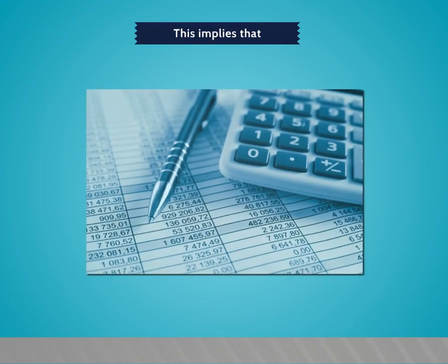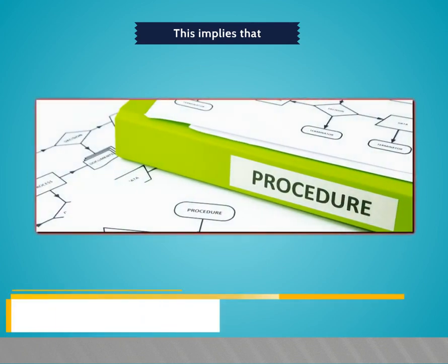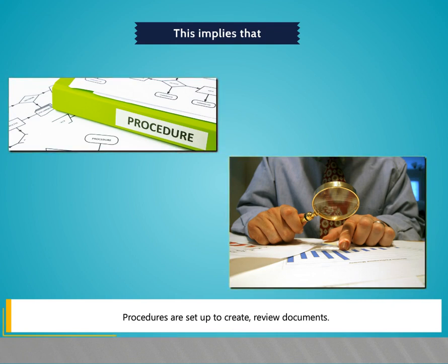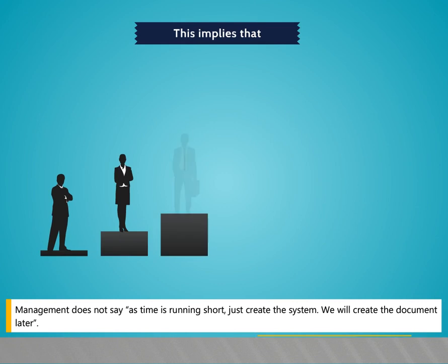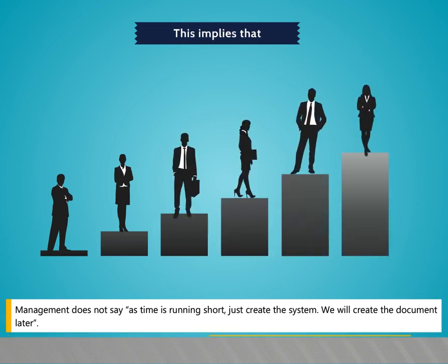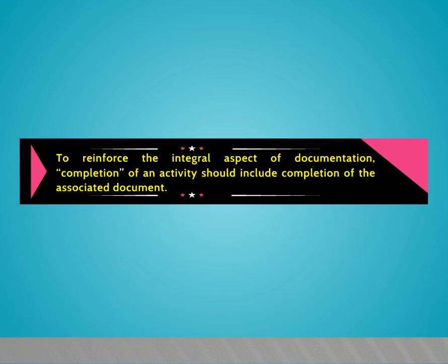This implies that the budget should include documentation effort. Procedures are set up to create and review documents. Management does not say, as time is running short, just create the system. We will create the document later. To reinforce the integral aspects of documentation, completion of an activity should include completion of the associated document.